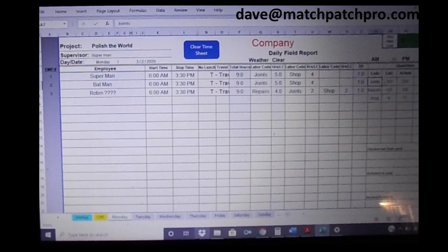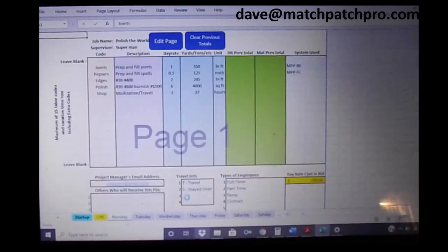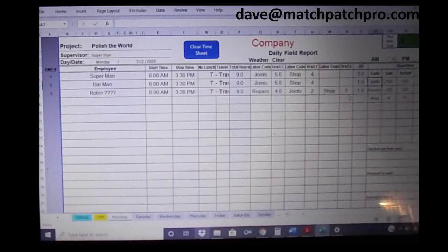This up here shows that our crew is in the green. It would be red if you were over-labored on it, if you'd underbid your labor bump. We have $290 in for our labor bump, and our crew's costing us $274.23. So you go through and you fill out the timesheets with the tasks.